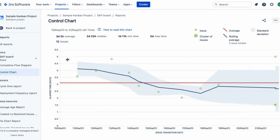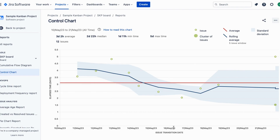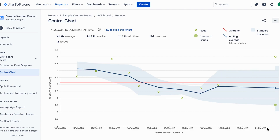As you can see, the control chart shows the cycle time for your product, version or sprint, over time. The y-axis represents the elapsed time in days, while the x-axis represents issue transition date. This chart lets you track how your team is progressing.